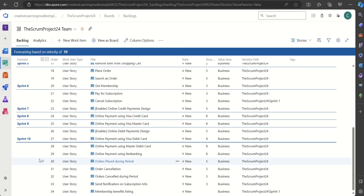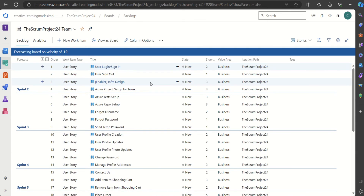During sprint planning the team commits to work, so there's a planning phase. Then there is actual velocity, which is derived based on the average amount of work the team has finished in past iterations. Right now this is all about planned velocity. For teams that are already working on sprints and know their velocity, they can enter their actual velocity.